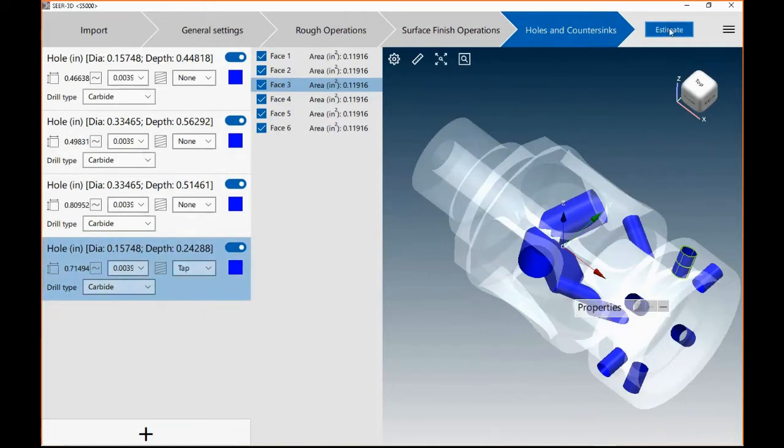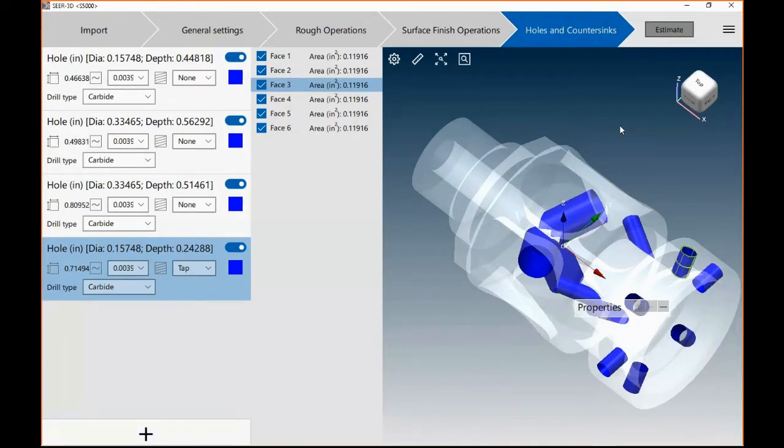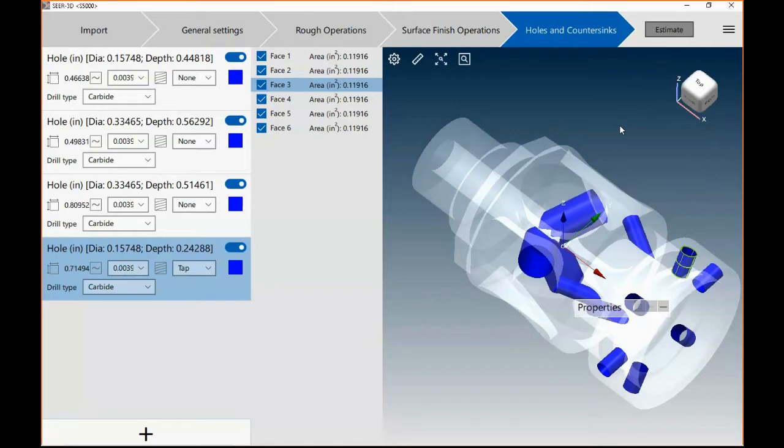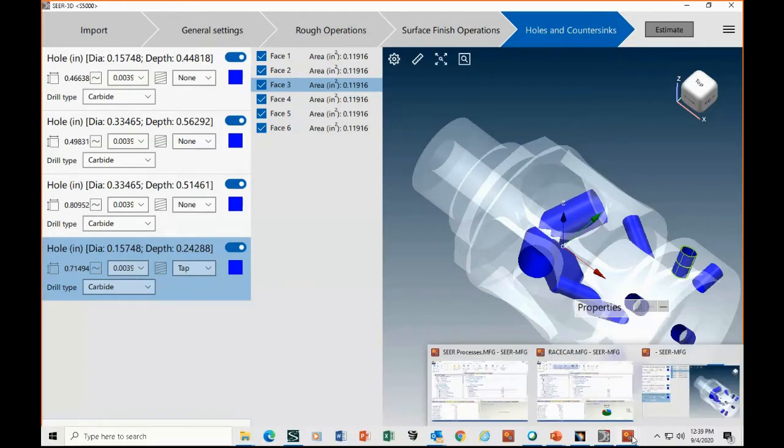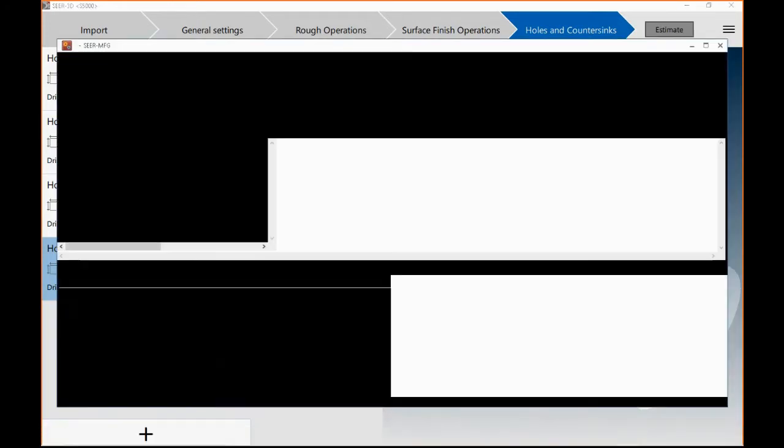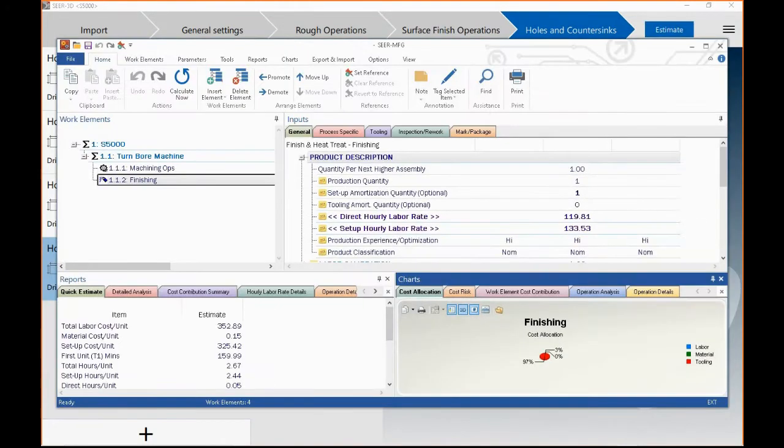Once you've gone through the model, told it what you want SEER to model for you, you simply go ahead and tell it to estimate. Now, what's going on right here, SEER is interrogating all of those surfaces, all the features it found in that STEP model. It's assigning a SEER manufacturing process to each of those features, and then bringing in the data that you've given it, such as the tolerances on the holes, the fact that you're tapping holes. And it is now working diligently to get me an estimate. And there it is.